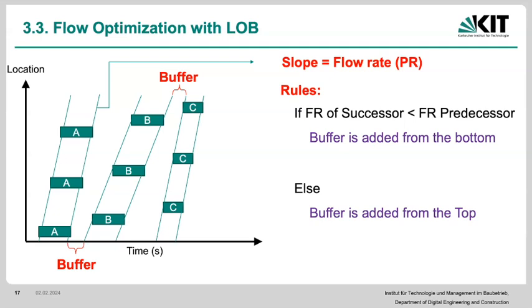So that is basically the art here. How do we play around with it so that we can make that happen? Essentially, the kind of precursor to that would be that any activity whose production rate or flow rate is slanted or has a slower slope is going to be our critical activity. That is the activity that we need to be able to pay attention to, right? Because that is what is predicting our schedule or our inefficiencies in our schedules. Make sense? Yeah, okay. Fantastic.